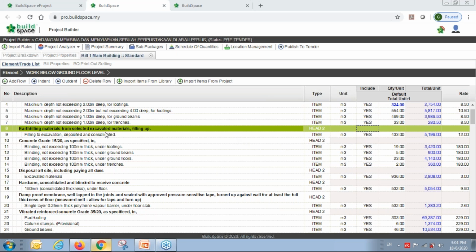Can we lock such that the contractor cannot revise any price other than the specific addendum item? No, during the tender resubmission, we allow the contractor to change any price. We cannot lock it to just the addendum price. Our current practice is we allow them to change all the prices before the tender closing.